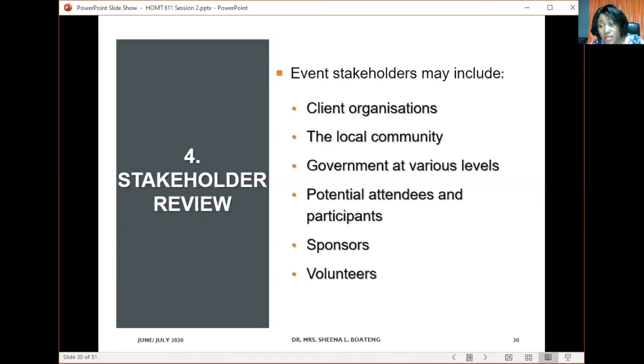Okay. Sometimes people organize health walks, marathon. You need a permit to organize it because it's going to cause an obstruction. And sometimes security agencies have to be deployed to make sure that it is done in a peaceful manner. If you want to organize a protest or a demonstration, it's an event, you need permission from the Ghana police. So these are all various levels of government that you may need consent from, depending on the events that you're organizing, right?